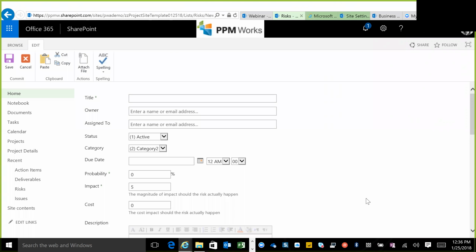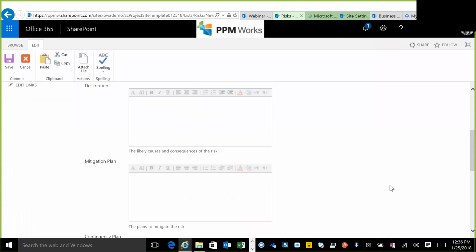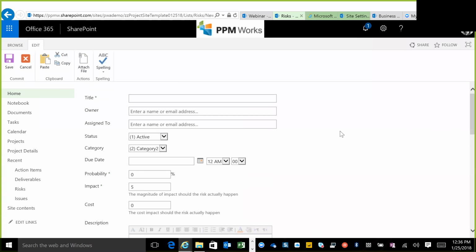I speak from experience because I did this in a test environment, gosh, I want to say like 6 years ago, when I was more of a newbie to all this. I tested it, assigned it to a project type, created a bunch of projects, created a bunch of risks, etc. Thought it worked great, implemented it in a customer's production, and 100 sites failed within about 48 hours. So I had to manually rebuild them. So, painful lesson learned. So do not delete any of these fields.